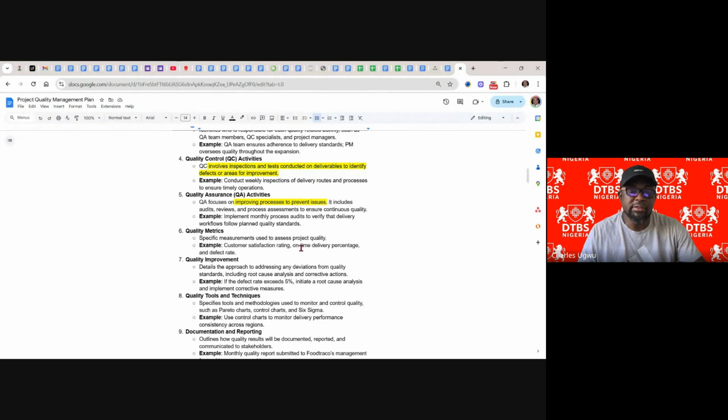Quality metrics. When we talk about metrics, we'll talk about measurement, like rating, percentage. We already talk about like 95% or a threshold. You must have a threshold used to set as a benchmark for pass or fail. You must have that as a metric. Example here is customer satisfaction rating.